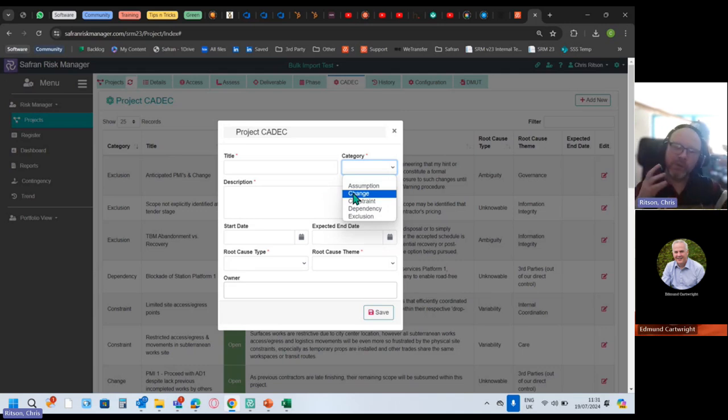So you can build a picture of where the risks are because of the nature of the dependencies and what's being excluded from the contract, or maybe it's grey, it's a bit silent, is that in or out of the contract? So you might want to be clear and say, this risk we are not taking, and you want to communicate that confidently back to the client organization and say, look, we think these are your risks, and put their name as risk owner on some of those things, which actually, just interestingly, is going back to our bow tie.